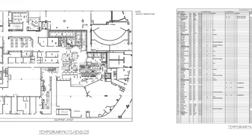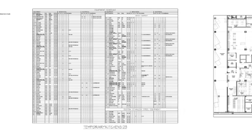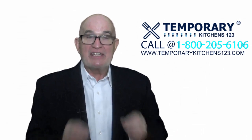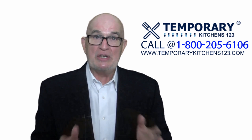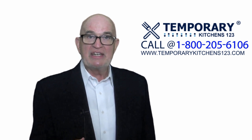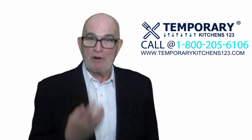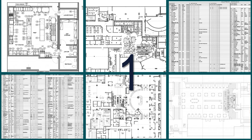A typical building department submittal package for modular dining facilities contains roughly 50 detailed documents. A temporary kitchen health department submittal typically contains roughly 100 detailed documents. At Temporary Kitchens 123, we do the job that no other company wants to do and can do. We provide expedited permit services for both commercial modular buildings and temporary kitchens health permits.